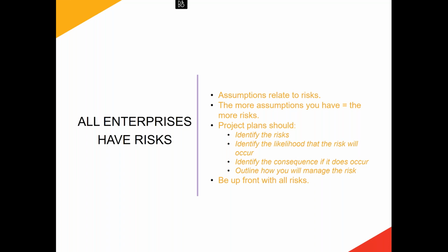I have the unpleasant duty of writing to all unsuccessful applicants in each round. The most common reason why assessors score applications low is that the applicant hasn't addressed the risk element of delivering the project, or hasn't made appropriate assumptions around the potential for slippage and what might occur if there's slippage. We can deal with slippage in milestone payments for successful applicants by a variation request.